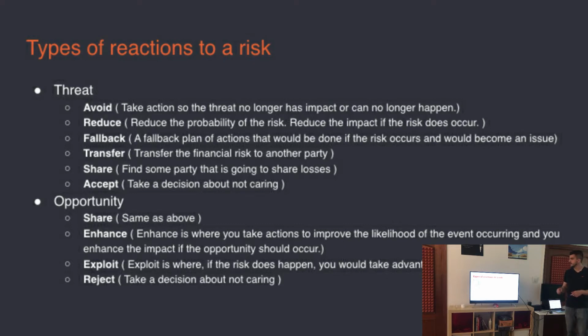Okay, I'll assume yes. Reducing is the same thing, but not to the very zero. So you reduce something, but still take into the equation that it might happen. It's usually something that is much cheaper than avoiding, but it depends how much time you have or what kind of budget we are aiming at.